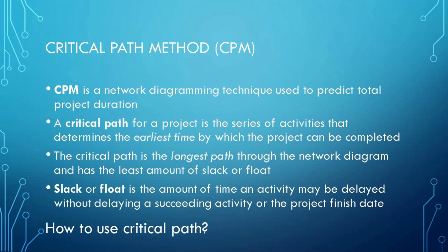How to use CPM. As with Gantt charts, the essential concept behind critical path analysis is that you cannot start some activities until others are finished. These activities need to be completed in a sequence, with each stage being more or less completed before the next stage can begin. These are sequential activities.